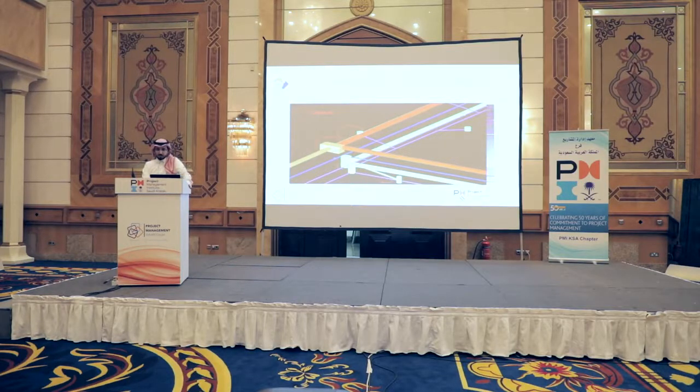And as you know by now, one of the key objectives from utilizing BIM during the construction is to evaluate the constructability and resolve the design clashes that have not been identified or resolved during the design phase. So this screenshot shows a clash report from the final design package prior to utilization of BIM in construction. So in the report, we can see a high number of clashes identified, which is not resolved.